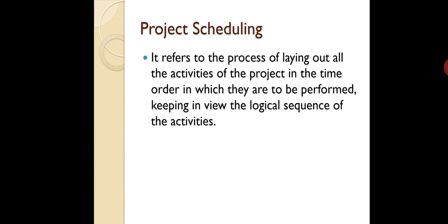So we have to dig the foundation, we have to pour concrete, we have to start constructing walls, then we have to construct the roof, then we have to go for some plumbing work, we can go for some electrical work, then we have to go for some interior, wooden work. So these are the activities performed in a project which is the construction of a shopping mall.